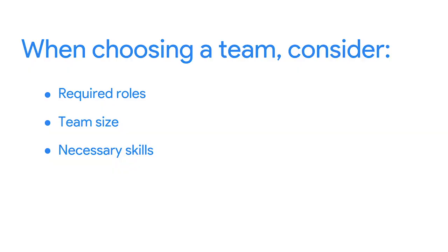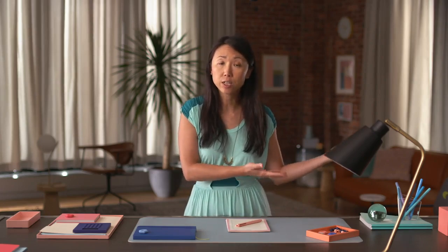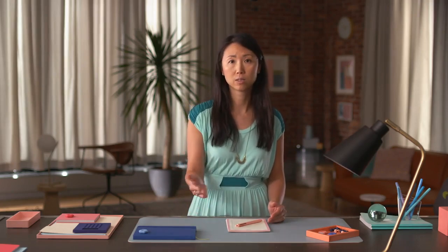When choosing teammates, a project manager also has to factor in each person's availability and whether they'll feel motivated to complete their assigned tasks. For example, you might know a fantastic site manager who'd make a great asset to the team. But if they're already staffed on another big project, they might not have the time to commit to yours. Or even if they do have the time, they might not feel like this project will give them the visibility they need for a promotion.